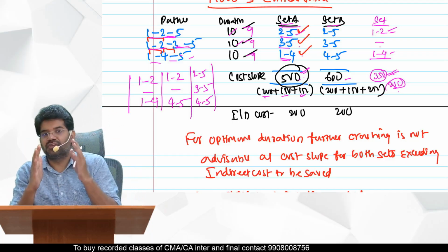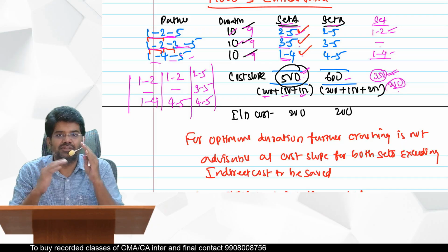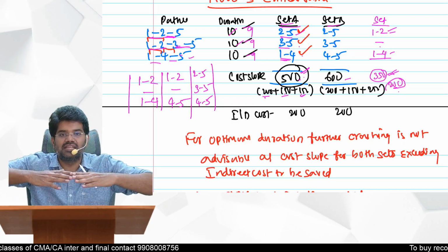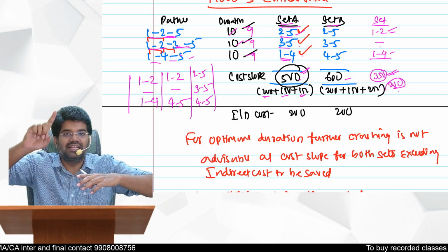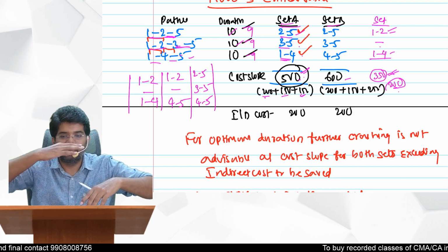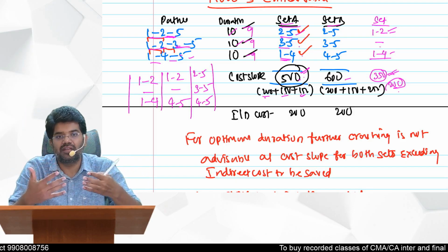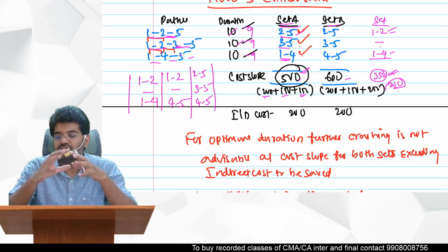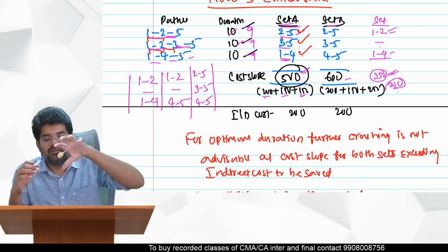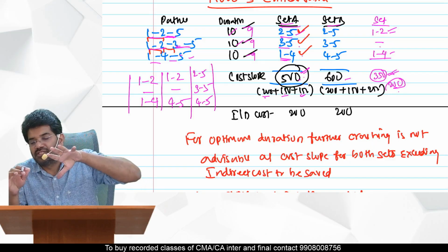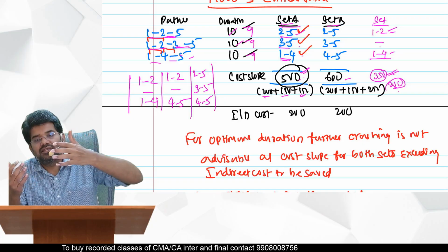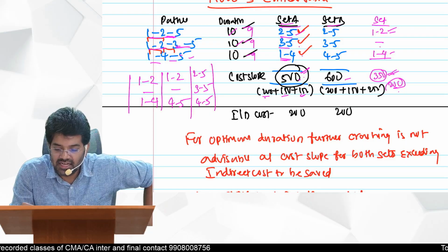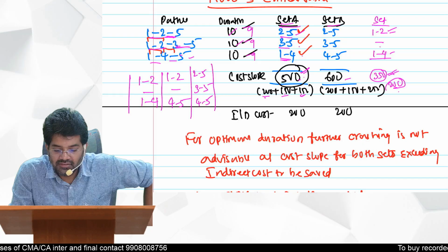Okay, first preference is to try to find one activity which is common in all the paths. What is the advantage in taking that? With one day only, all paths will get reduced or not? Yes. If you have that kind of activities, you find them. If those are not there, then you can create a combination of activities in the form of sets. Then sets you can crash. So here you see set A created: 2 to 5, 3 to 5 and 1 to 4.